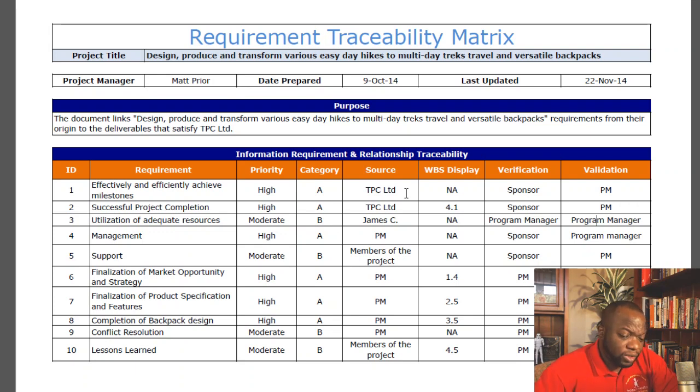And at the end of the project, when the implementation was done and we were going into the go live mode, we needed to make sure that each of those requesters had indeed signed off on their specific requirements for that system. And that's how it's used. You know, it's nothing more than that. It's a document that tracks requirements to their origin or requirements to their requester. All right, I hope that helps you, Ahmed, and all the best as you continue studying.